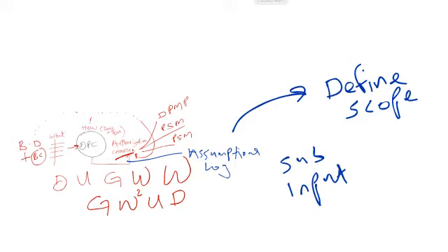Why is my assumptions log going to define scope? Because in define scope, this is where we put together the entire scope that needs to be undertaken to fulfill those requirements. And as part of defining what needs to be done, we need to ensure that our assumptions and constraints have been considered and baked into that scope of work.